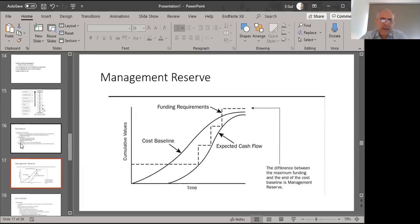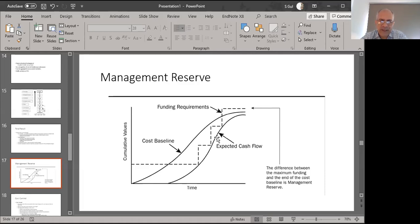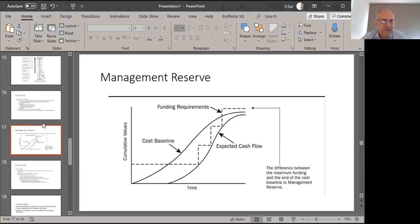A couple of words about management reserves: here we have two S-curves — one at the top is the cost baseline, showing the expense we're going to incur. The expected cash flows represent money we're spending at different points in time. Wherever a difference exists between the two curves, that is where management reserves come in for the future.